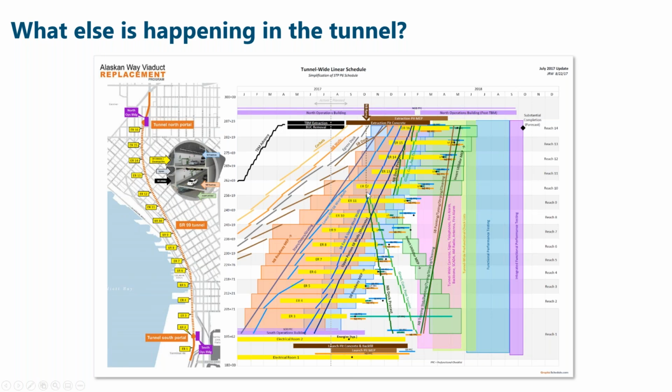As you can see, the yellow bar is horizontal because it's fixed in space. It's a station itself. So it's horizontal. The station is the same, and it takes time, okay? The inclined lines are the services that are moving from one end of the tunnel towards the other end of the tunnel. The inclined lines are the services that go from A to B, as he says, right? From the start to the end of the work.